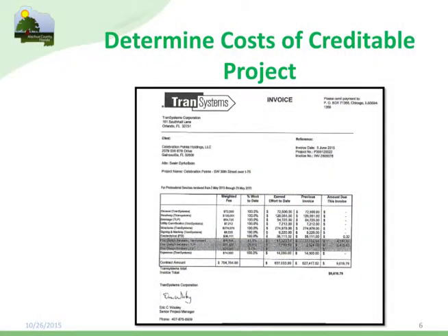So when we're determining the costs, we have a couple of different ways that we can do things. For small projects, we don't require you to get an appraisal. If you're dedicating right-of-way, just as an example, we'll let you take the property appraiser's value for your land. We allow for a 30% addition factor because our property appraiser pretty reliably underappraises property. So we allow that as a simple thing for somebody who's donating a small piece. For other projects that are larger, we require an appraisal, and then we can reimburse or give credit for that right-of-way. We're typically not buying right-of-way from people at this point. We're trying not to buy right-of-way from people.